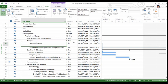Yeah, great question, and it's a frequently asked question, and it is going back a little way into the presentation, but the whole reason for the approach that we've presented today is because if you flag a risk or an issue at a project site, it is not automatically going to be copied to a program level site. And that's regardless of how you achieve the creation of the program entity. So for example, if you had a master project like I've just created, even if that was published, it is not going to automatically amalgamate all the risks and issues that might be loaded at the project site level. And when you think about that, although initially it probably sounds desirable, that amalgamation would actually be quite difficult to control,